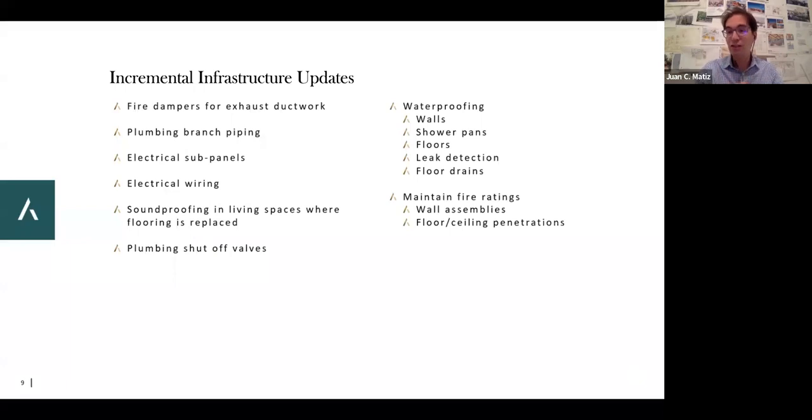Fine. But at least you're consciously knowing that you're increasing your cost or your job by 15, 20 grand just to move that sink over, because you have to now take the wall open, do all the branch plumbing that is on the list here, the horizontal connections, get a plumber to do all of that work. We do the copper connections, make sure that it's got the arresters for the air when you're using any of the plumbing fixtures, and you're redoing the wall in its entirety as opposed to cosmetically changing the bathroom. So there are times when we actually apply the brakes on the intention of some shareholders.